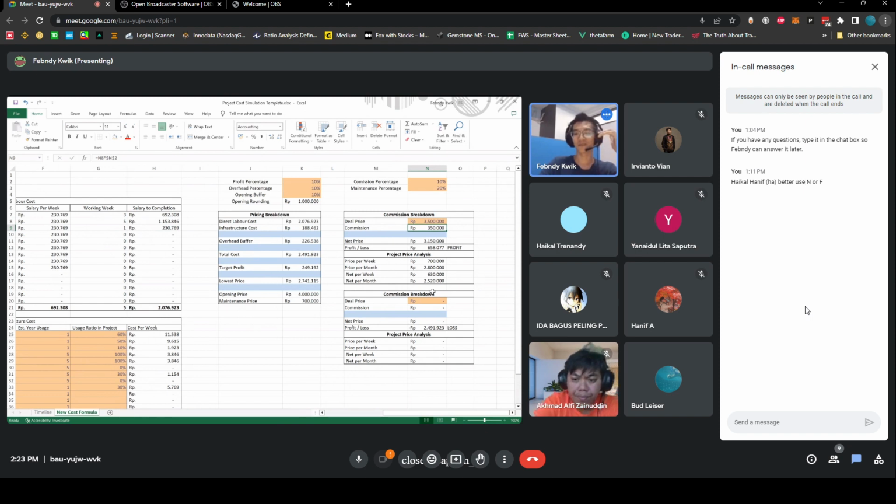This is just another copy of the top, so I can do two comparisons. Do I want to give 3.5 or do I want to give just 3? Then this means I get the profit that I want. This means I get less profit than I expected. But once I do it like this, my lowest price was 2,750, for example. Okay, but this means I lost money on this deal, because then I have to pay a 10% commission to whoever is giving me the job.